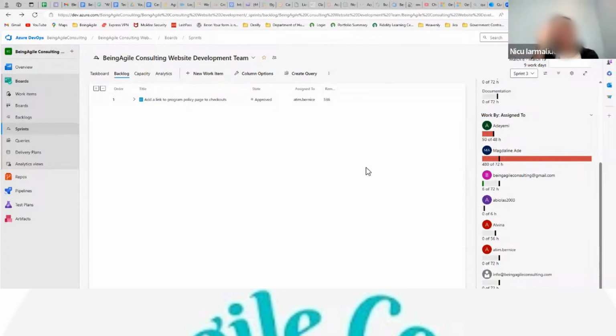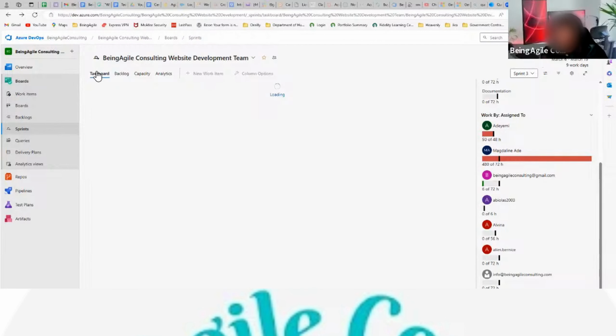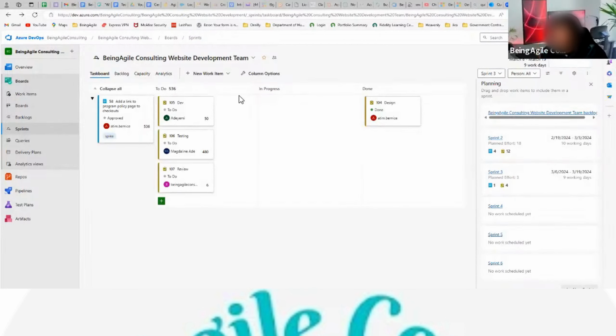Okay. Yes. So it will only read when it gets to done, which is why it's very important that they update their work on a daily basis. One of the mistakes, or anti-patterns, that I've seen too is, yeah, they will be making progress. They're actually getting things done, but they are not updating the board to reflect the reality. So it will look like they are not making progress.